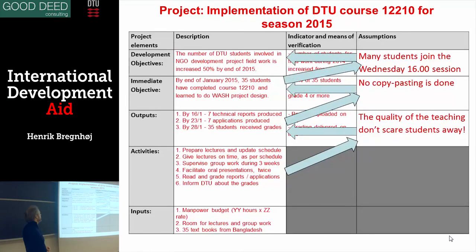This is where the framework becomes logical. If we're doing these activities, if I'm teaching, facilitating, all that, and you're not scared away, then you will actually deliver your reports. If you deliver your reports, and you're not cheating, you're not copying the things in your report, then you learn how to do watch projects. And if you learn that, and you participate and take interest in hearing about how to do fieldwork, then you're probably going to be involved in doing fieldwork. I cannot really control these things, I can only do my best.